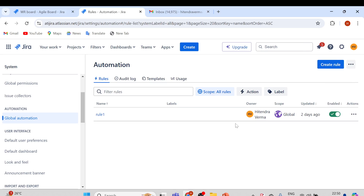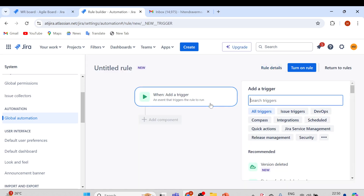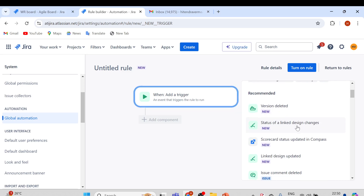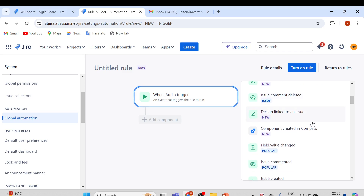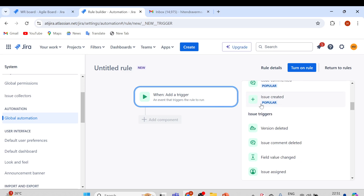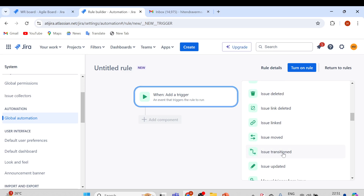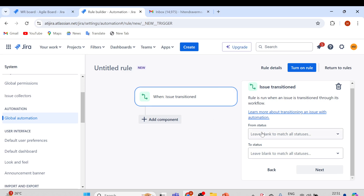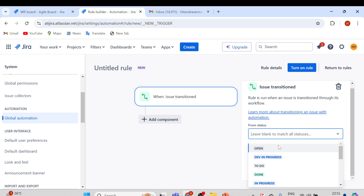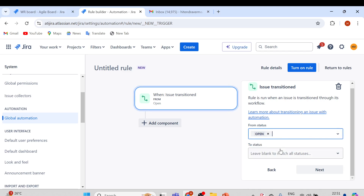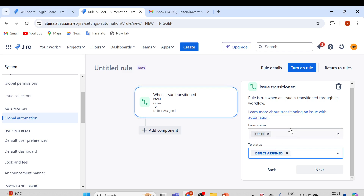If I click on Rule One, you can see: when an issue is created, assign the issue to the issue reporter. That's the rule we created. Now let me click on Return to Rules, create new rules, and show you. Click Create Rule. For the trigger, what event do we need? Here we have some recommended options. This time let's use Issue Transition — issue transition from one status to another. Select Issue Transition, and it will show you 'From Status' and 'To Status'. From Status: Open.